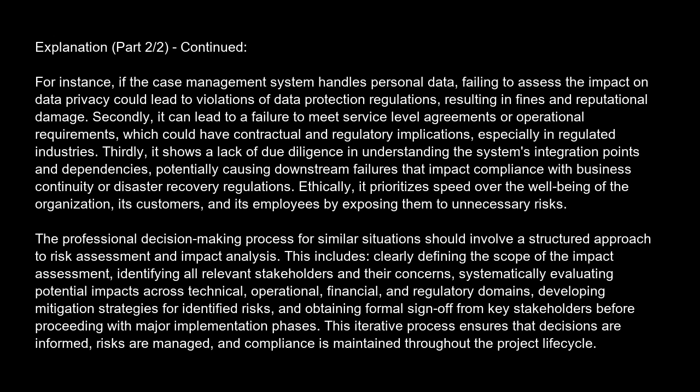risks. The professional decision-making process for similar situations should involve a structured approach to risk assessment and impact analysis. This includes clearly defining the scope of the impact assessment, identifying all relevant stakeholders and their concerns, systematically evaluating potential impacts across technical, operational, financial, and regulatory domains, developing mitigation strategies for identified risks, and obtaining formal sign-off from key stakeholders before proceeding with major implementation phases. This iterative process ensures that decisions are informed, risks are managed, and compliance is maintained throughout the project lifecycle.